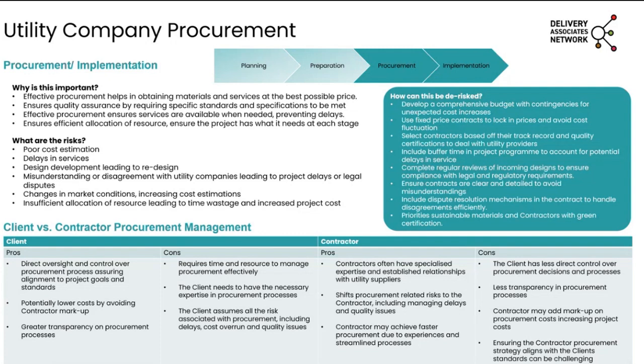There is usually a very valid reason as to why the design is as it is, but that's not always obvious from looking at a line on a plan. So make time towards the end of your project to review anything received from the utility company and discuss it with them and challenge it where necessary.